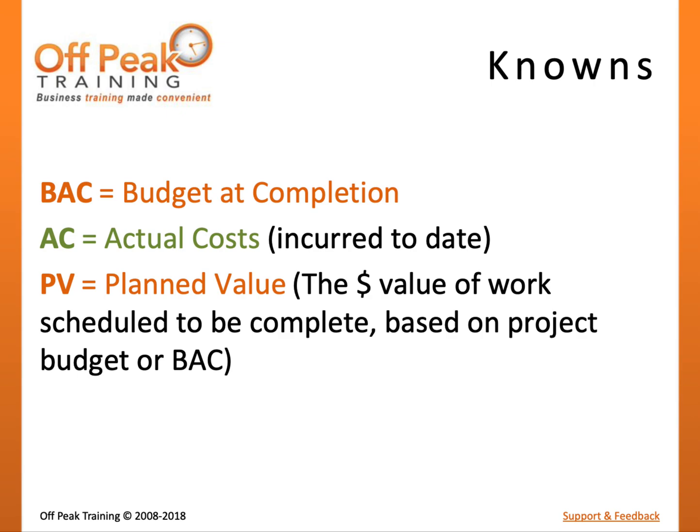Planned Value represents the value of work that should be completed based on the current date and time. By knowing the percentage of work that should be completed and the Budget at Completion, the team can calculate Planned Value. For instance, if the project was scheduled to take five days and cost $1,000, the Planned Value after one day — or 20% of the schedule — would be $200. Simply put, Planned Value is the dollar value of the work that should be done.